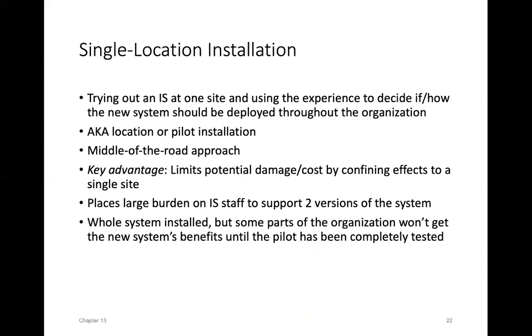So we would always use them as a single local installation before anybody else. And assuming all went fine, then we had the confidence that the system rollout would be best for all the other locations. You think about London, where we might have, I don't know, 300 users using a single system versus 6. If there's a problem, you only want to impact 6 users in a non-important environment versus 300 in a very important environment.